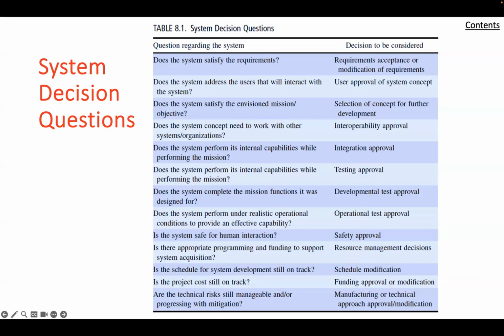It is imperative that the resources types are planned and accounted for prior to the development phase or key decision points. Some of these resources, such as manufacturing, material, or test ranges, require long lead time to coordinate. Plan for contingency actions if there are unforeseen delays in the project development, and to have some utilization of the resources, such as people shifting to different projects or non-dependent tasks within the project while the project undergoes a delay.